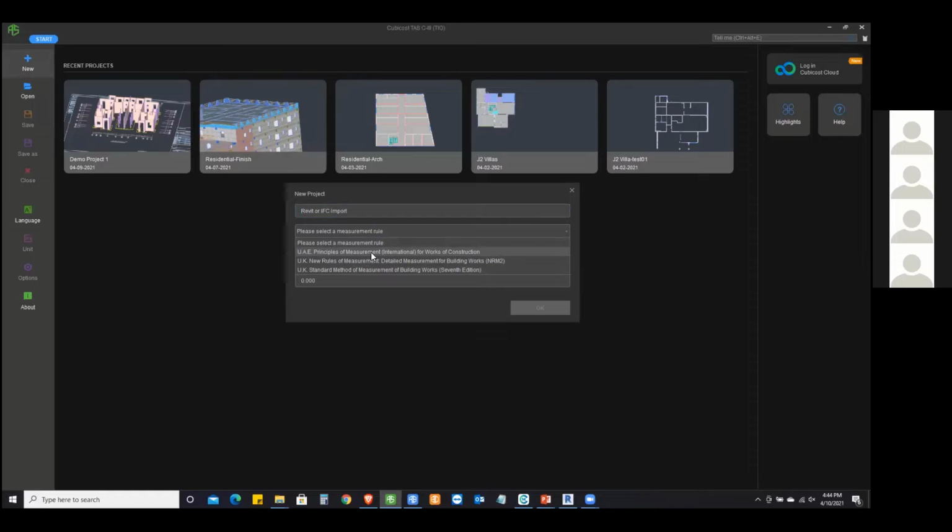Of course, this question was there yesterday, but what I'm going to do is try to highlight the points in regards to the difference between TAS C-TIO and Revit, and how Revit quantities are different from this one. As I mentioned, the biggest point is the measurement rules. They cover everything related to the rules: the relation between elements, how the deductions take place, and how calculation rules get applied to each one of them. So this is the biggest part.